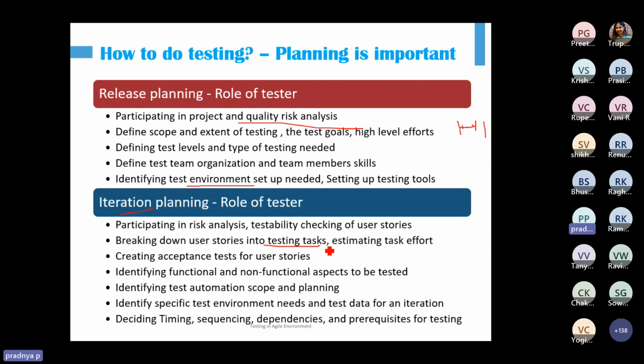Otherwise, the development team can commit to a lot of stories because there is less work for development. But as a testing team, we will not be able to keep pace with them. And for that, our contribution to the story estimation is extremely crucial.